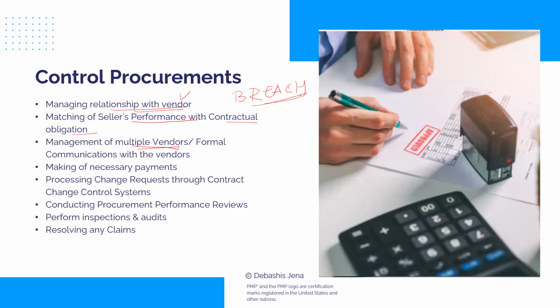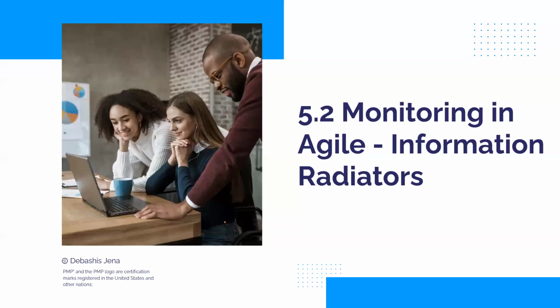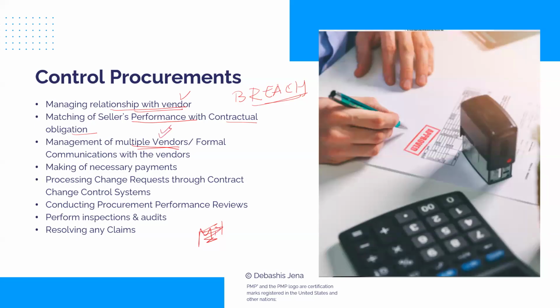In fact, this is a risk mitigation measure. Are you able to appreciate? Say you rely on one vendor and that vendor is not able to provide you with the amounts you want. Okay, so your work would stop, right? So that is why many times you have multiple vendors. Okay, so I said it's a risk mitigation strategy.